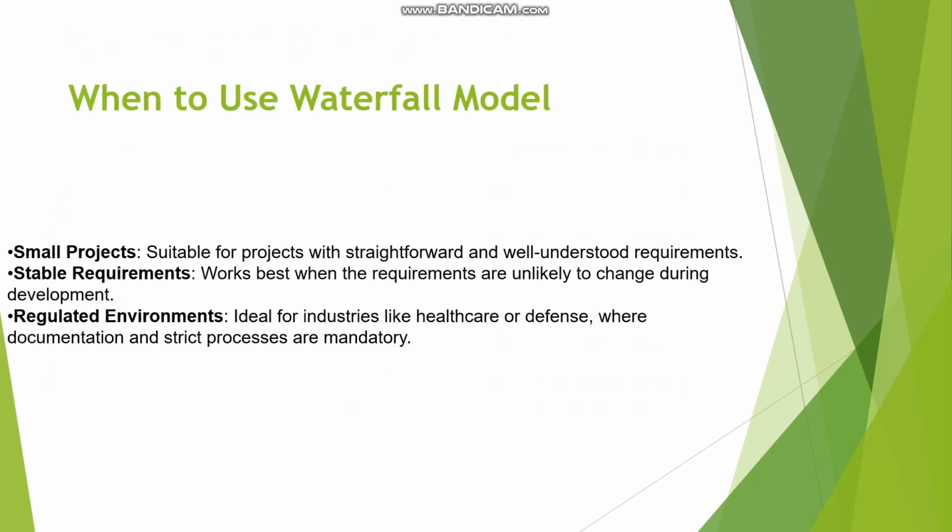When to use the waterfall model: for small projects, suitable for projects with straightforward and well understood requirements. Stable requirements: works best when the requirements are unlikely to change during development. Regulated environments: ideal for industries like healthcare or defense where documentation and strict processes are mandatory. This is about the waterfall model.